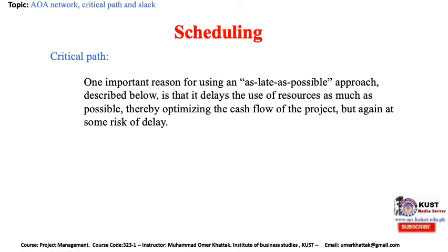Critical path. One important reason for using the as late as possible approach described below is that it delays the use of resources as much as possible, therefore optimizing the cash flow of the project, but again at some risk of delay.